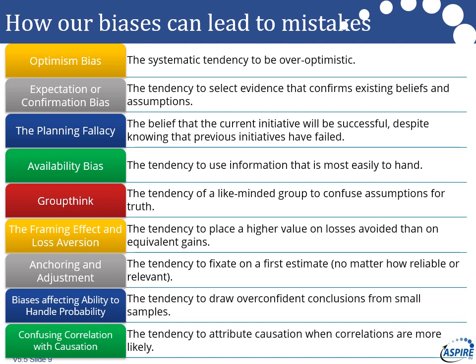Anchoring and adjustment. You see this all the time, particularly in capital projects, where there's a tendency for the first guess to be taken as the definitive answer. It's a massive problem, particularly in the public sector, because the Treasury goes off and budgets a certain amount of money, and then gets upset if you ask for more. Think of things like High Speed 2 and Crossrail, all those big ones. The initial estimates were horribly wrong, but everybody's judging them against that initial estimate.